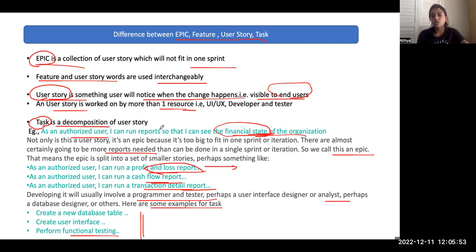What if you are not able to finish a user story in one sprint? Do you think we can extend the sprint? The answer is no. The sprint time frame is usually not changed. If you define it as between 1 to 4 weeks, it should still stay the same. And if you are not able to finish the user story, the unfinished story will go back to the product backlog. From the product backlog, we will again prioritize it with the product owner. So we will understand what is the business value that the story adds.